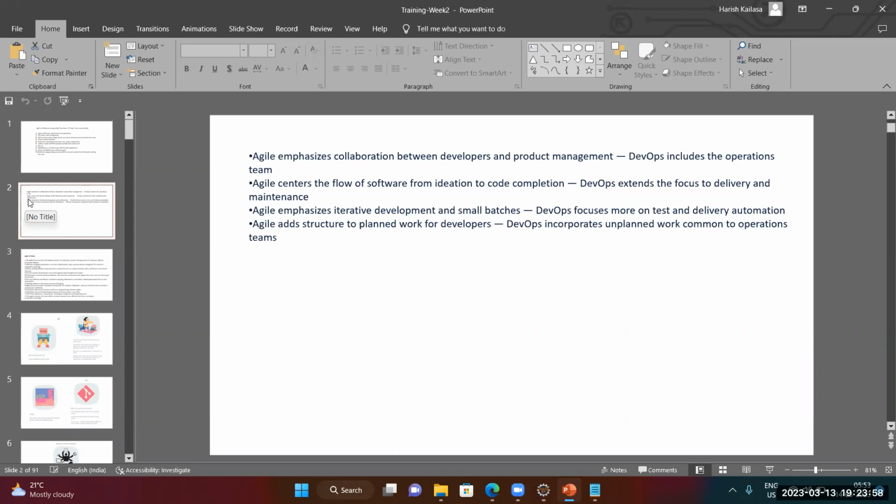This is very high level information about Jira and about agile. When we work in agile, there is a certain time limit for each deployment. Starting from today, there will be 2 weeks of time for the first deployment, and we call these 2 weeks a sprint.